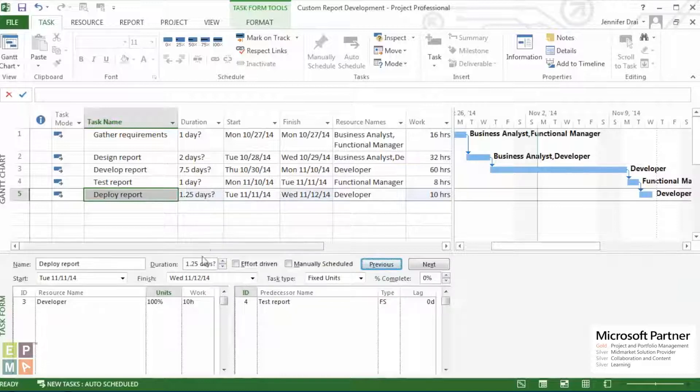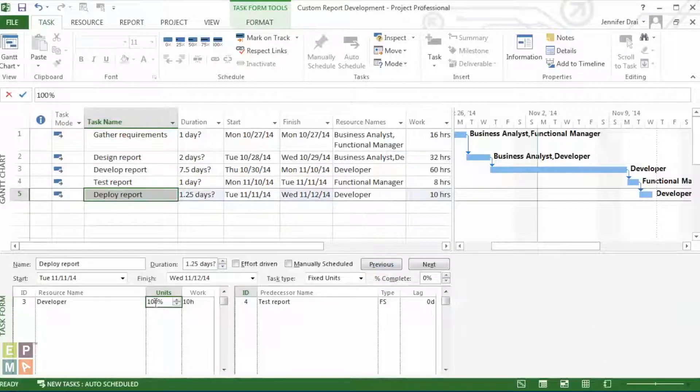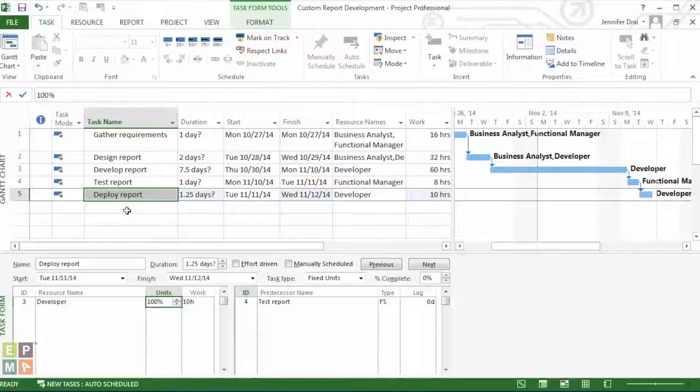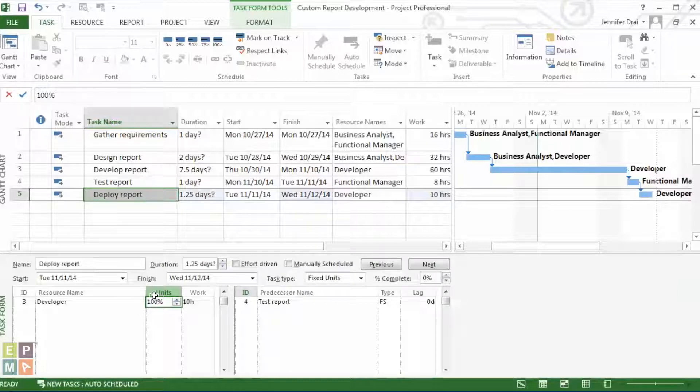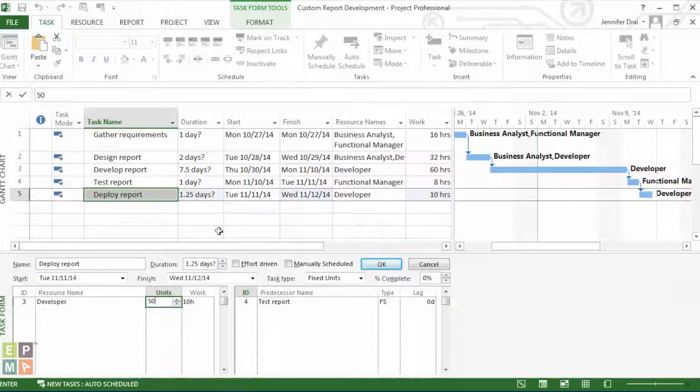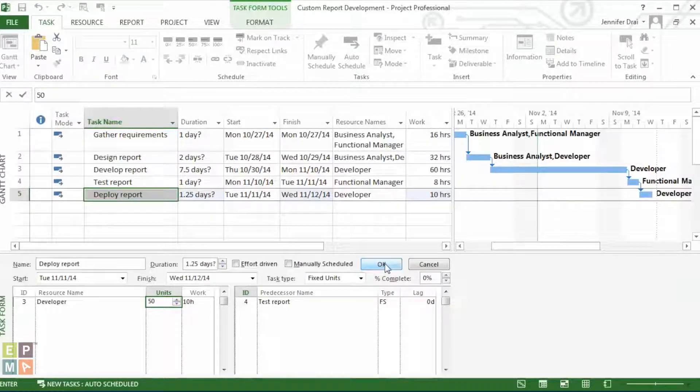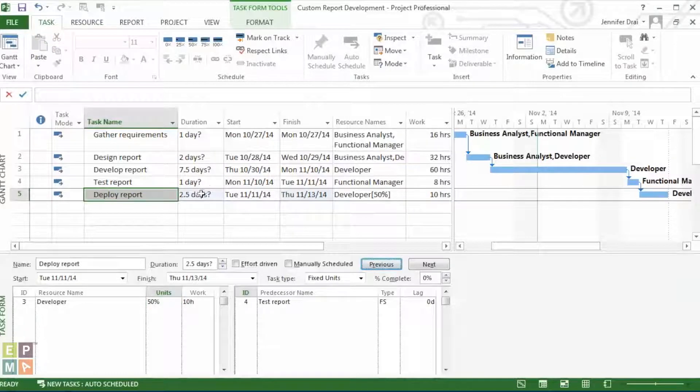Now, notice that if we were to reduce the assignment of this resource to 50%, say because we know that by the time when this report is going to be deployed, the developer is already going to be committed 50% to another project, then we would be changing this. And notice how project will automatically increase that duration to 2.5 days.